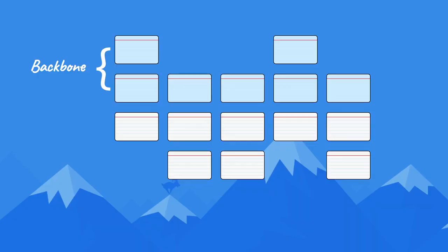As long as we're talking about terms, let me go ahead and define a few other terms used with story maps. After that, I'll describe how to create a story map and how to use it to convey a product roadmap. In story mapping, we use the term "step" to refer to any card on the map. Sometimes it's useful to refer to a group of steps. In a story map, an activity is a collection of steps that achieves some goal. For example, logging in might be an activity with the multiple steps of entering a name, entering a password, passing a CAPTCHA challenge, entering a code sent to the user's mobile device, and so on.